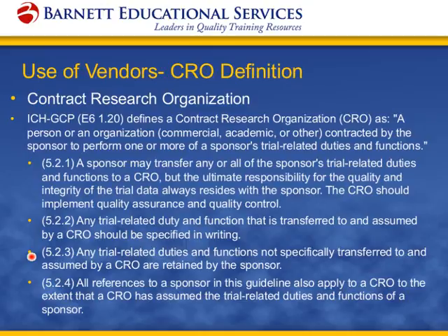But it hadn't formally been delegated in writing for that safety piece because, again, the sponsor was retaining all safety information. SAE reports were to go directly to the sponsor. The medical monitor worked for the sponsor. So it seems like a very, very minor oversight, but what it cost us in terms of time and resources was having to go back to all of those sites, have them print out any correspondence, any questions to the medical monitor, asking the medical monitor to go through and provide copies of everything that had occurred, and then backfilling that trial master file.